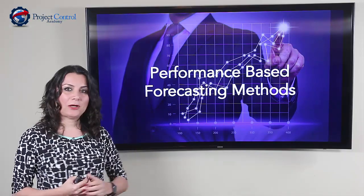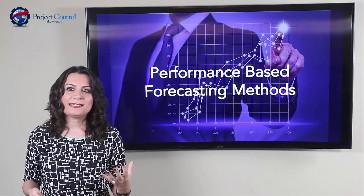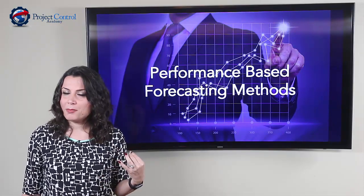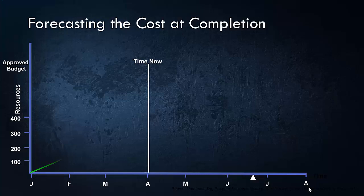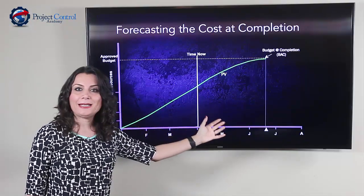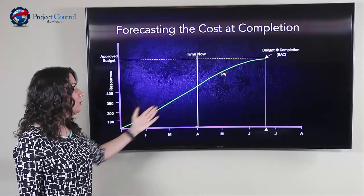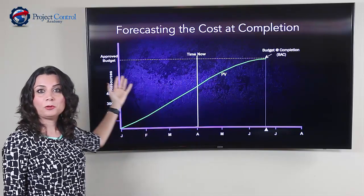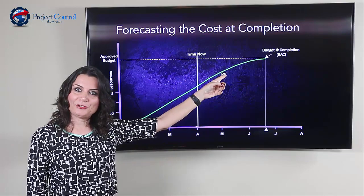Going back to the topic of today's presentation on cost forecasting — let's better understand what we are trying to forecast. Looking at this project example, we have distributed our approved budget over time, which gives us our Plan Value or PV. Plan Value is basically the time-phased budget distributed over the planned duration of the project. The total Plan Value at the end of the project should always match our approved budget, known in Earned Value Management terminology as Budget at Completion, or BAC.